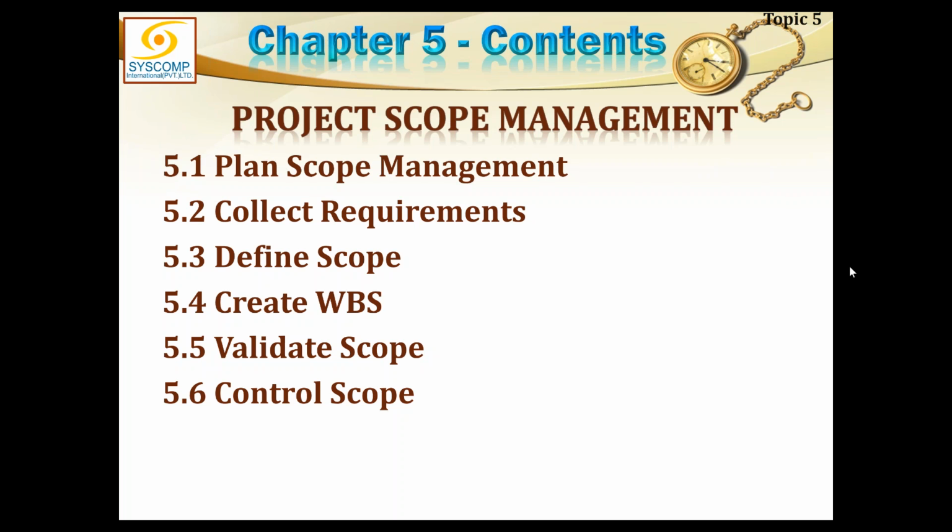Right, I was talking about the very first process in planning as far as the scope management knowledge area is concerned. And I said the very first process always would be to develop the management plan. So here our subject, our knowledge area is scope. Therefore, the process here would be plan scope management, and the output should be the scope management plan. But if you remember, when we were listing all the management plans, we said that in scope we do not have only the scope management plan, but there is yet another management plan which is prepared here along with the scope management plan, and that is the requirements management plan. So both of these plans, scope management plan and requirements management plan, are to be developed in this very first process.